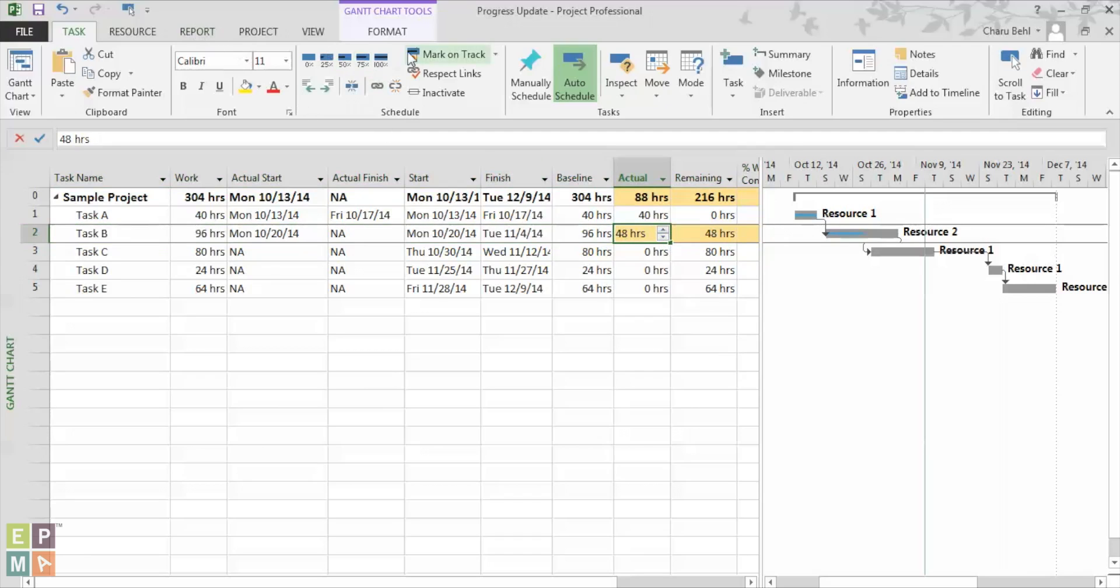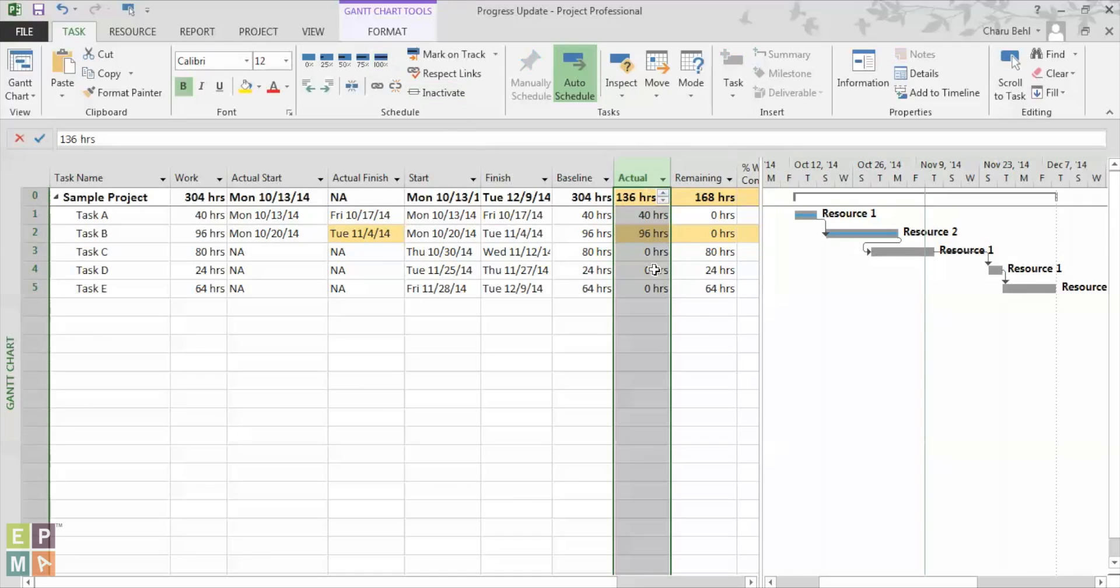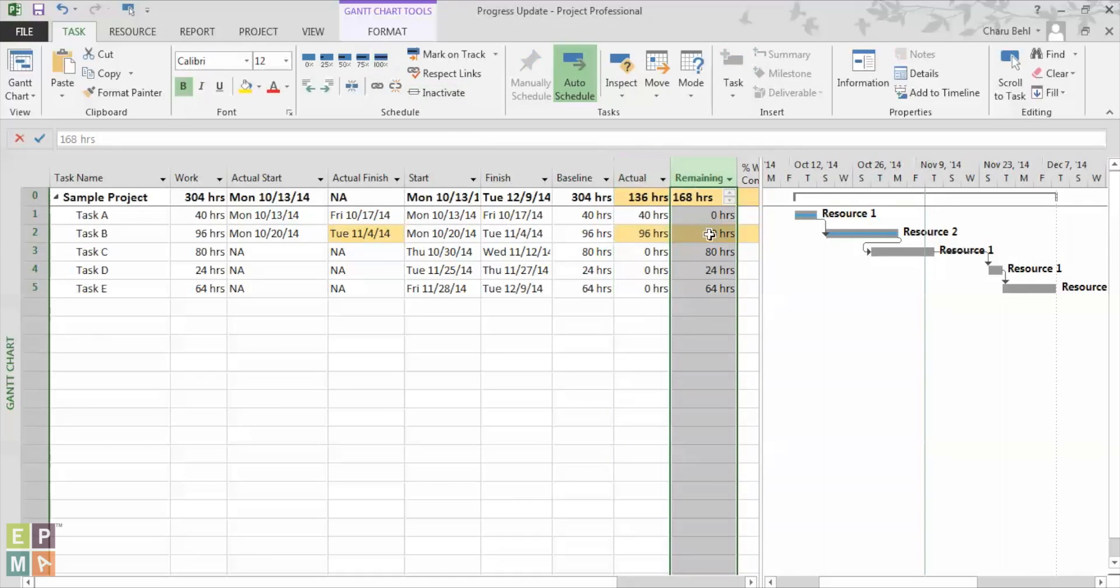And once I mark it as 100, the actual is 96% and the remaining is 0%. This method is a little better than the percent complete method because it actually gives managers the flexibility to put in the actual number of hours.